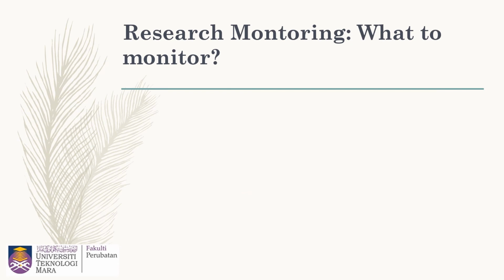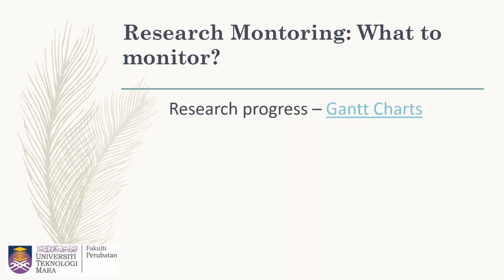Once you have acquired funding to conduct the research, you're ready to put the research methodology to action. During this time, it's very important to keep track of the research progress by regularly reviewing your Gantt chart with the team. A Gantt chart is a visual view of task schedule over a period of time. And when preparing a Gantt chart, you want to be realistic with the timeline and give allowances for any delays that could occur during recruitment of the subjects or any technical issues of a research experiment.